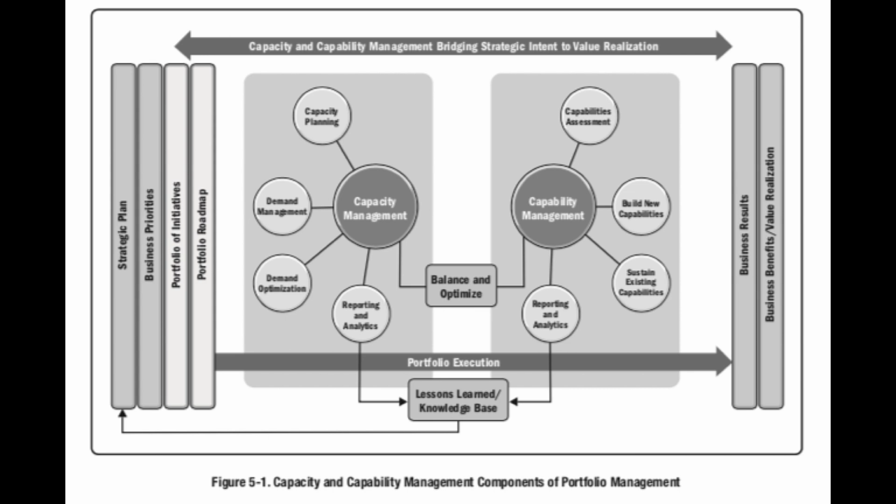Imagine a construction company that's juggling several projects at once. Through reporting and analytics, they might discover that their best project managers are consistently overworked, leading to delays. By reviewing the data, they can reassign some of the less critical projects to other managers and free up the key personnel to focus on high-impact tasks. Without these insights, the company might just keep pushing forward, unaware that they're driving their top talent toward burnout.